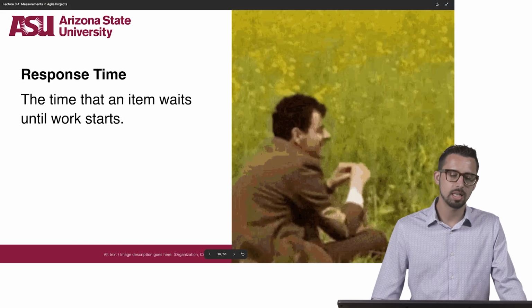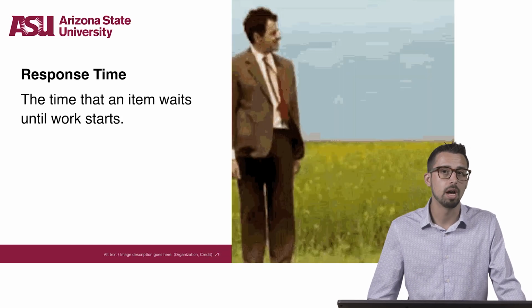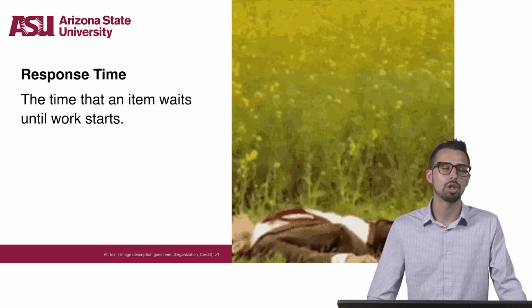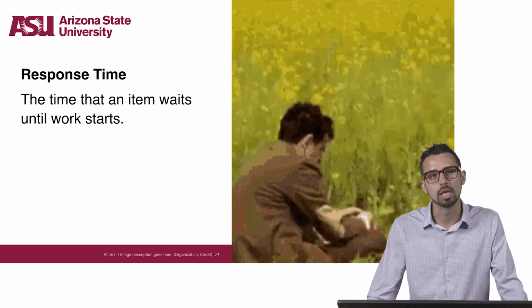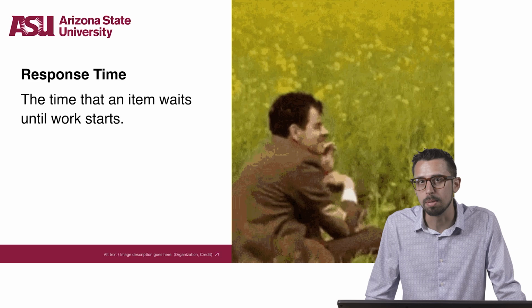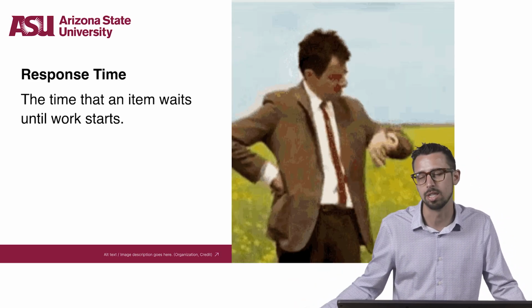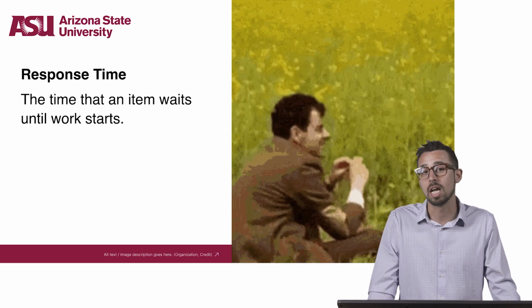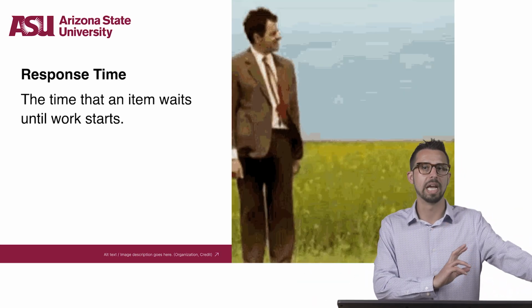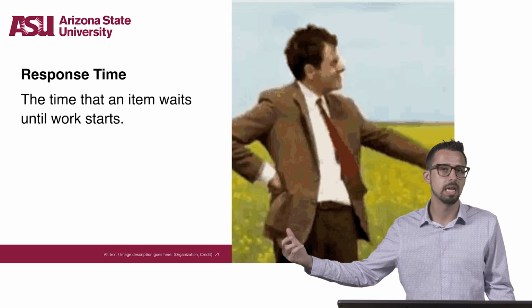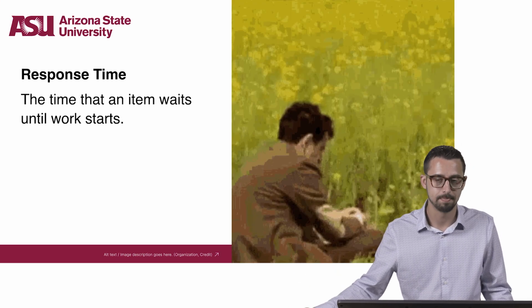Again, using the same example of the stakeholder needing a brochure designed, how long will it be before you can clear your plate of your other tasks before you start working on this new one? The amount of time a project simply lies in wait, plus its cycle time, is its response time.